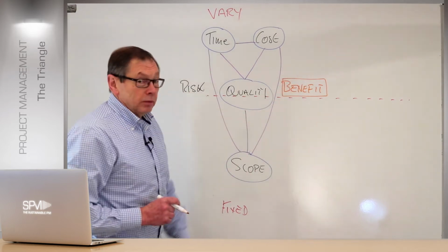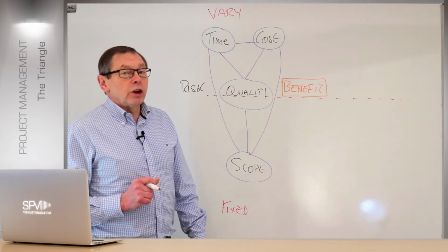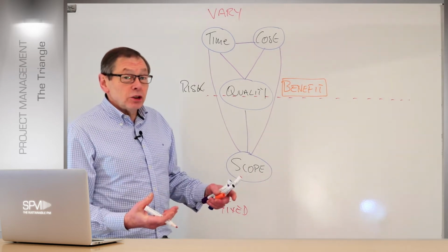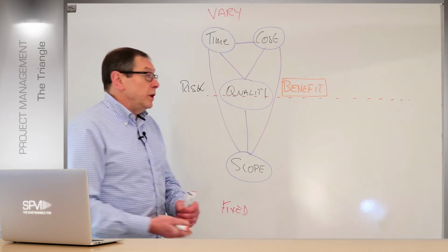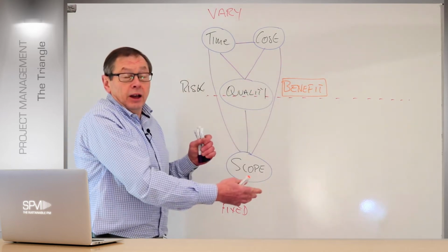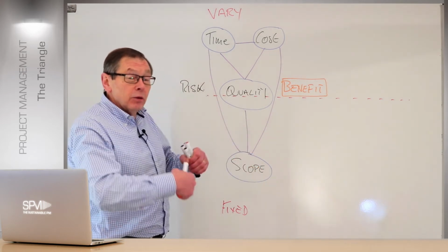Now, put that in the middle. At the moment, it's in the middle, as you'll see. But that is what we're really looking to deliver. That also has a variation on it. In some methods, like with Prince2, we have tolerances around this, and those are saying how much we can absorb, mainly from a reporting point of view.